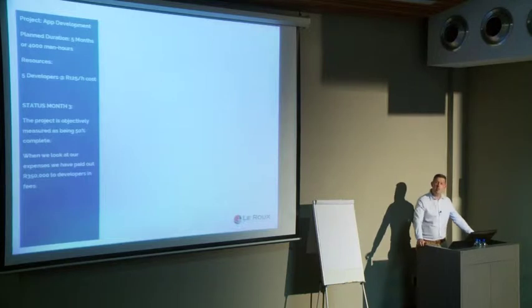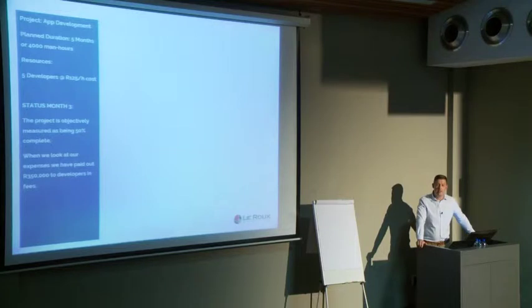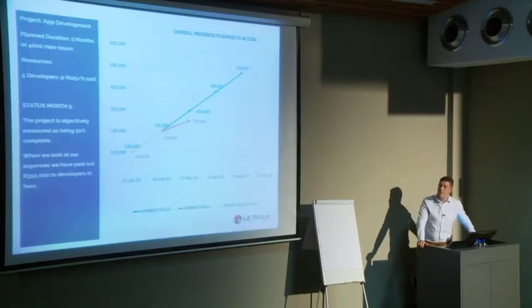So the first question we must ask on this project is, how much value did we earn for our effort? So if we can trust the objective measure of 50%, how much completion value did we earn? 250, which is half of our budget. Good. And now we ask, how much did we spend to earn it? 350. So that gives us our graph.